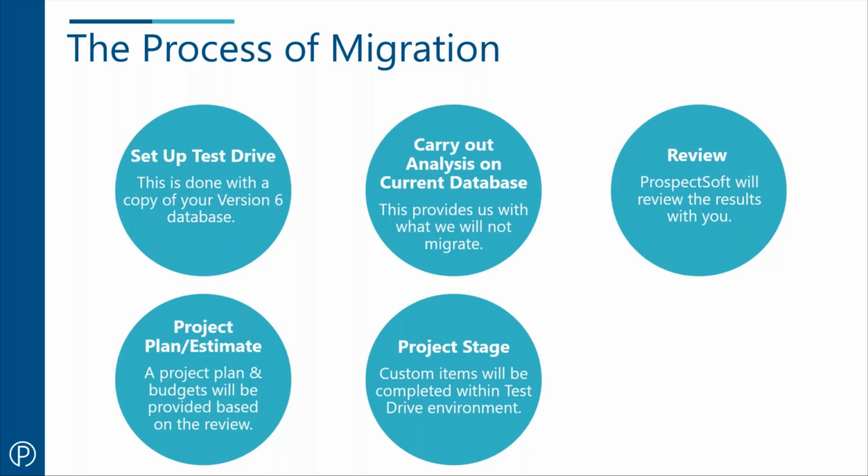During the project stage, we also rerun the test drive a few times as well, just to make sure that with the changes we're making, the upgrade process is still going to work and not come up against any hurdles, and it also allows us to actually run the migration from your server and give you a timescale of how long your database might be down whilst we run the migration.